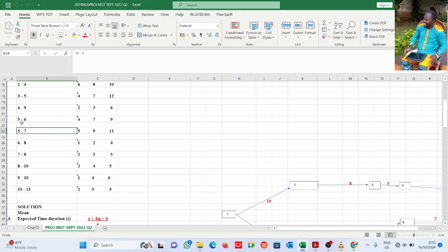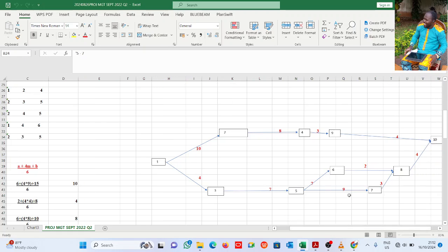Unlike what we have here, where one predecessor has 2 successors. That is 2 successors depending on 1 predecessor. Here, one successor is depending on 2 predecessors. It's just grammar, right? You do this one before this one and do this one before this one. So that's what it means.